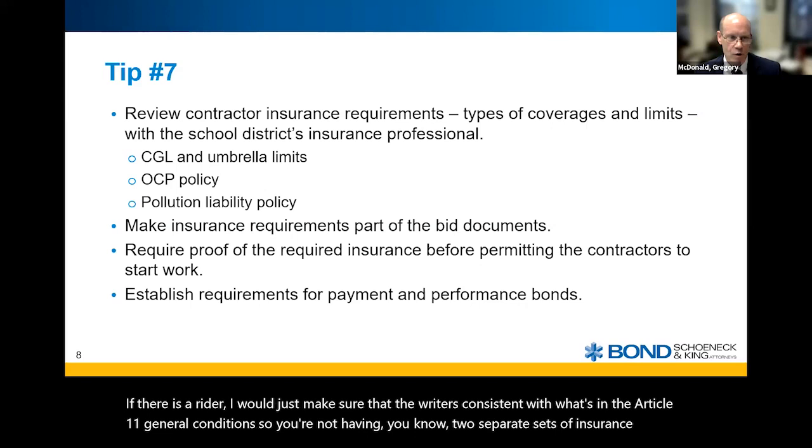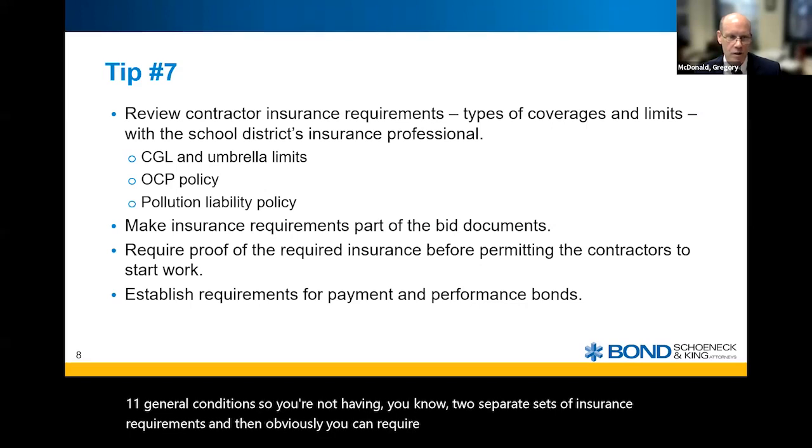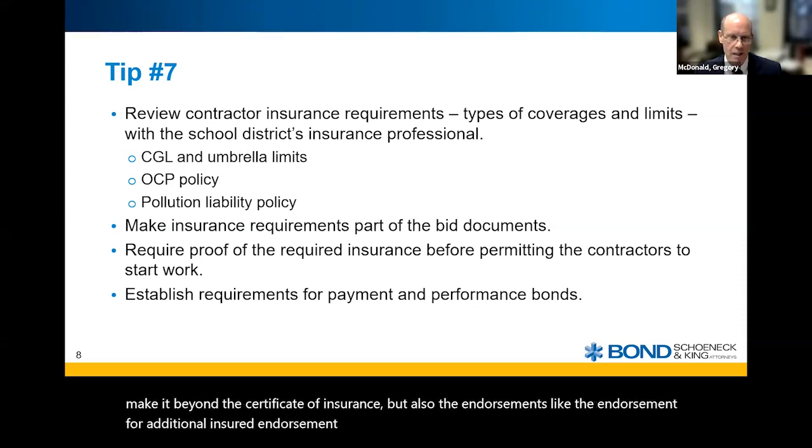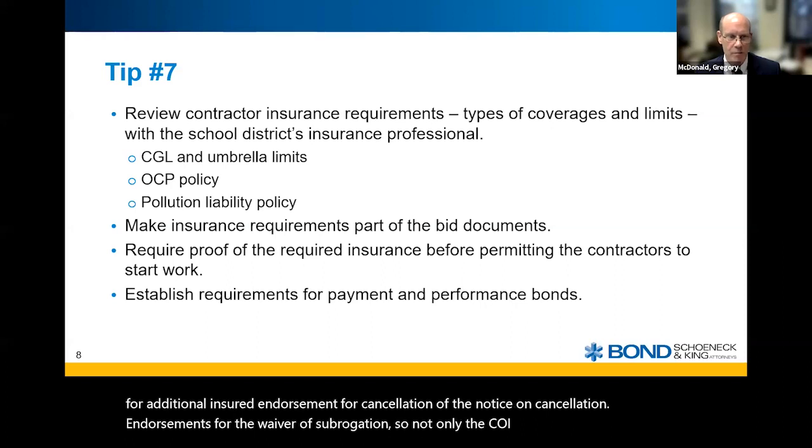And then obviously you're going to require proof of the insurance, and we typically make it beyond the certificate of insurance, but also the endorsements, like the endorsement for additional insured, endorsement for notice on cancellation, endorsements for the waiver of subrogation. So not only the COI, but the actual endorsements be provided.